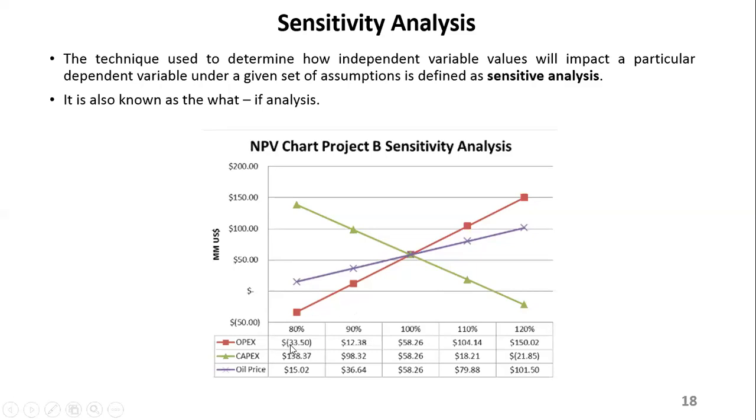But the main point is that if you look at all these variables, how they are changing, and then you compare how it is affecting your NPV. If you look at your NPV on this side, then they are plotted there. Then you see if your NPV is at a specific level, let's say your criteria is that it should not go below 100 million, then you can actually tell from the data what the conditions are.